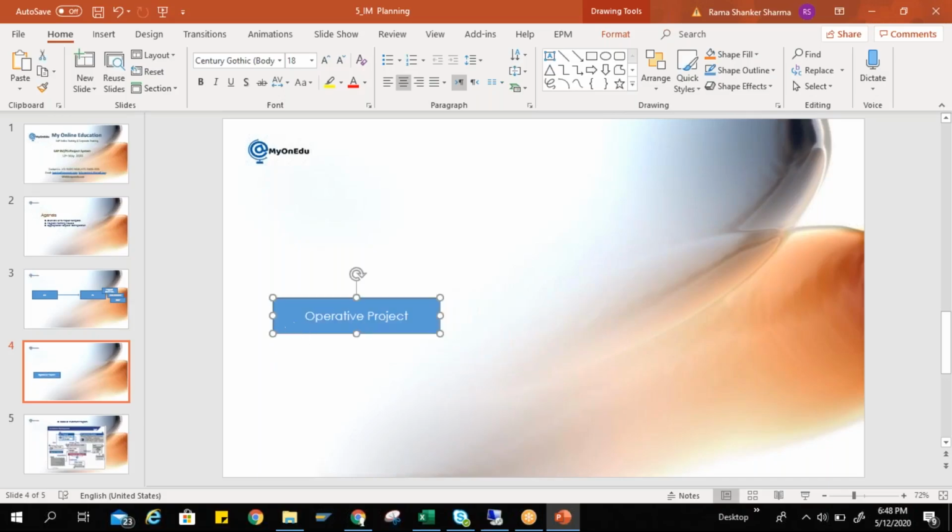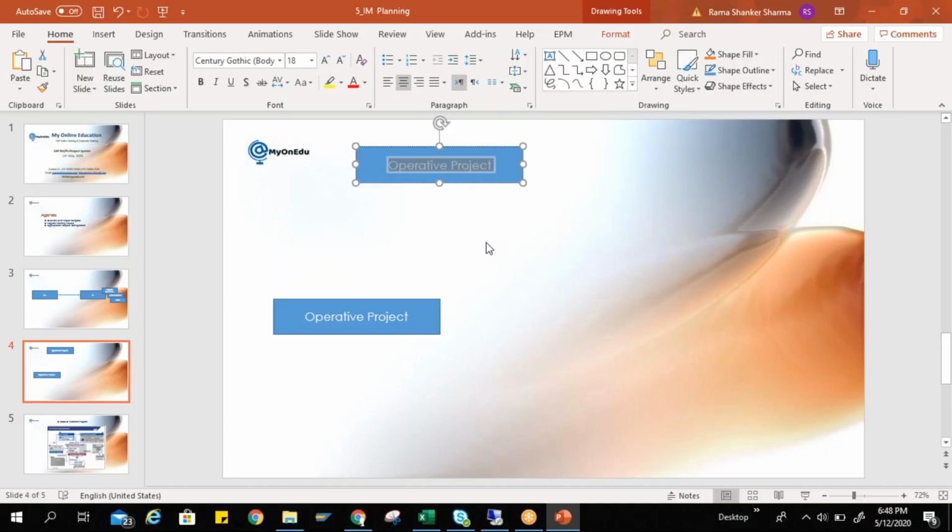Some projects you can keep as a template project, which will not be available in your project builder in CJ20, and there is a separate transaction for it. That is a standard project we call it. CJ91 is the transaction to create, CJ92 to change, and CJ93 to display.